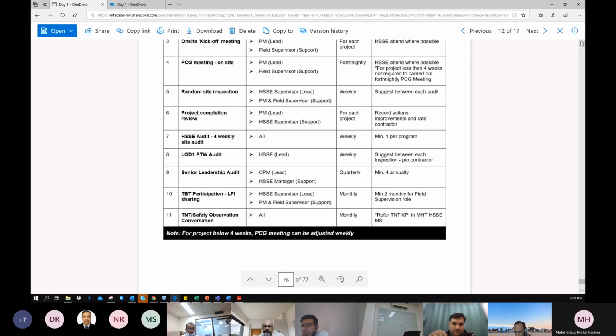LOD1 is mainly focusing on the permit to work system, for health and safety staff only. This is weekly, where high-risk works are undertaken on project sites. They can review the permit to work documents, the quality, whether all the assets are identified adequately, LMRA is done, and all the evidentiary records to certify the inspections and the work commencements are in place, to provide you an additional assurance, and it will be led by someone.